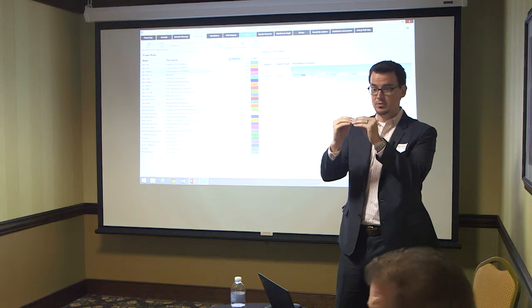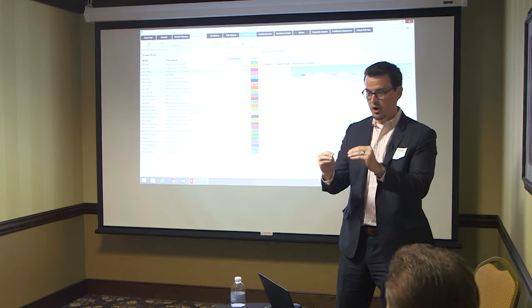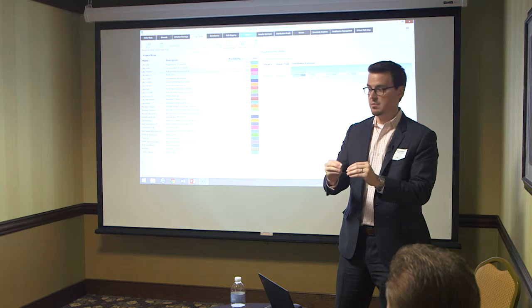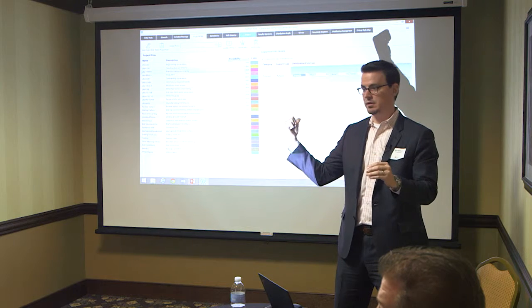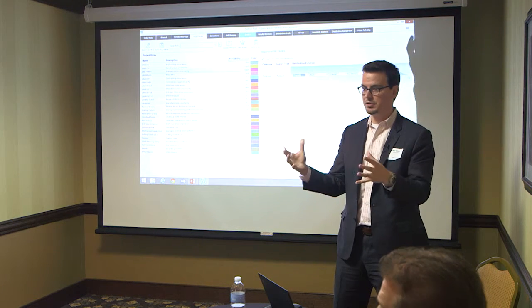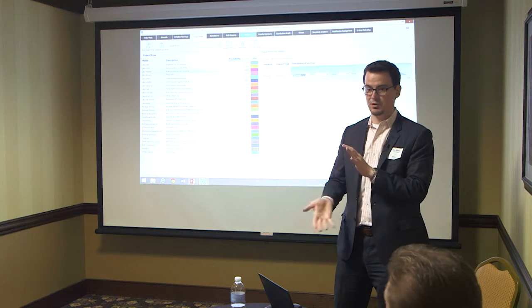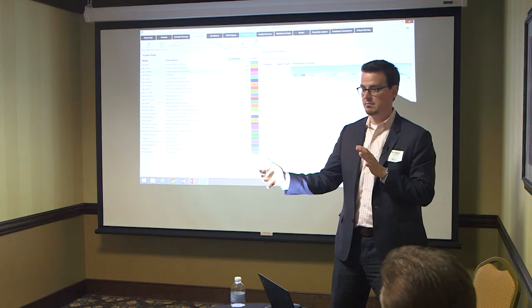I can apply a distribution at a high level and it correlates all down through the activities to avoid the impacts of central limit theorem. Kind of a common problem we've had in the past. We get rid of it with risk factors. It's natively built into the application the way we built it. We design it from the ground up to avoid issues like that.